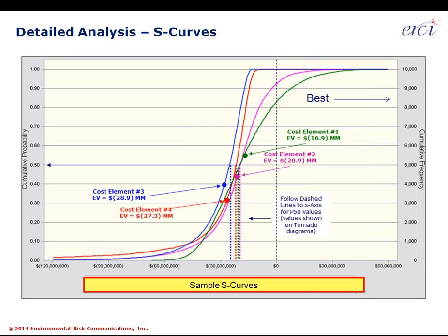A user is able to also articulate from the points that are drawn in there, which are the expected values, and identify if the expected values are above the P50 value, above the median, or below the median. And again, there are different interpretations, different analyses that come out of seeing that a number is very widely skewed or has a big difference. There's a big delta between the P50 and the expected value. That's essentially a very important point in communication. It does explain that a cost forecast has a lot of uncertainty embedded inside.